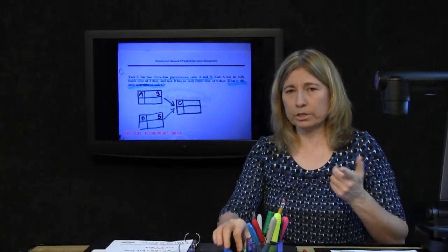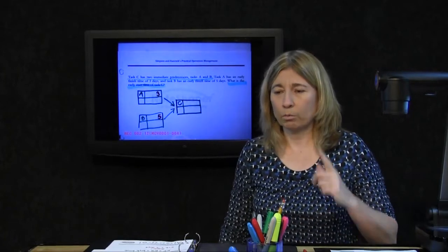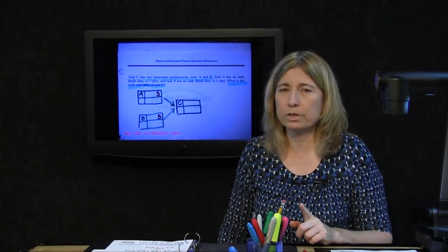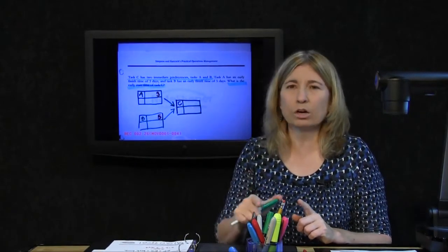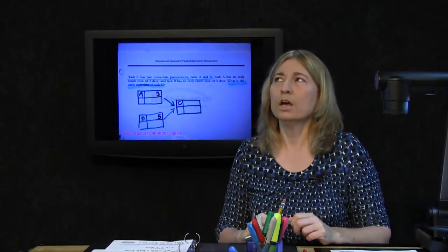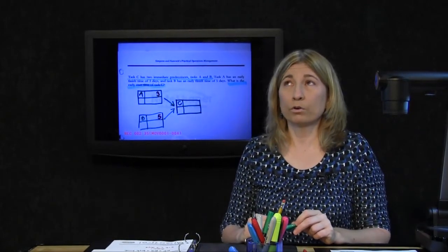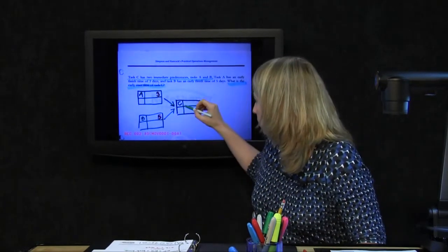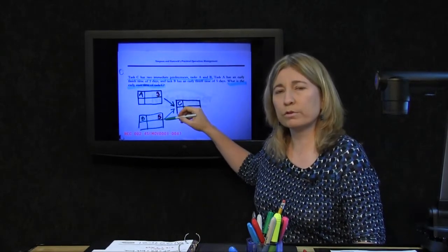This particular question is an invitation to practice the early start time rule. Now, write it down if you have to, but it's best to be able to remember it. Let's rehearse. The early start time of an activity is equal to the largest of all the early finish times of its immediate predecessors. So here, in the case of C, we would be going back to look at the immediate predecessors, and we're just looking for the largest.